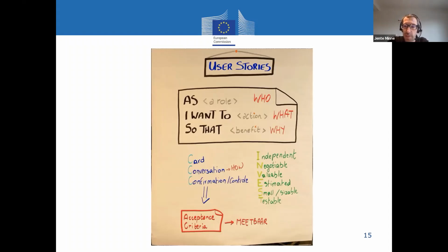Let me give you an example. I want to create a document, a contract. One of these tests could be: if I click on this button, the contract automatically comes out in Dutch for Dutch clients and in French for French clients. Then the tester knows, okay, I have a French client in front of me, I push this button, and the French contract comes out. Okay, it's developed as designed, as they say.